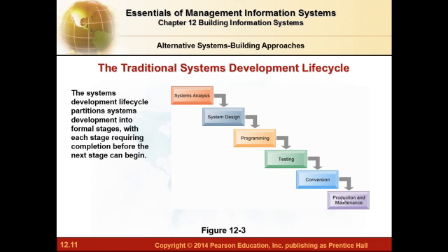The traditional life cycle may seem rigid today. There are very definite roles for the technical person and the non-technical person. In fact, the user is left out of the loop on a lot of the development and implementation. Even though end users and managers have to sign off and accept the system at the end of each stage, they are not as involved in this method as some of the others we will look at later. So the life cycle approach works well for major systems but doesn't fit the bill for smaller ones. It's expensive, time consuming, and sometimes doesn't allow technical and non-technical people to work together as they should.